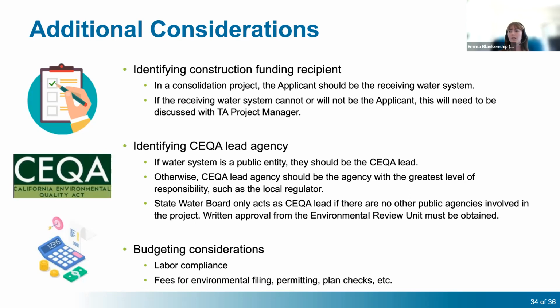Also, if a water system is a public entity, then they would typically be the CEQA lead. Otherwise, the CEQA lead agency should be the agency with the greatest level of responsibility, for example, a local regulator. Also, the State Water Board can act as the CEQA lead in some cases if there are no other public agencies involved in the project. But in order to initiate that, you'll need to get written approval from the environmental review unit before identifying the state as the lead. A couple last budgeting considerations.